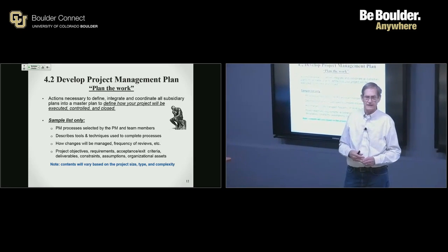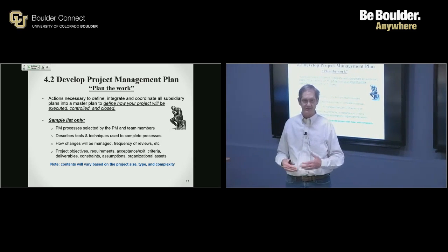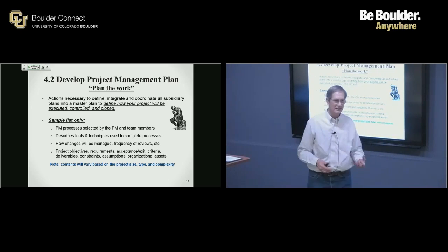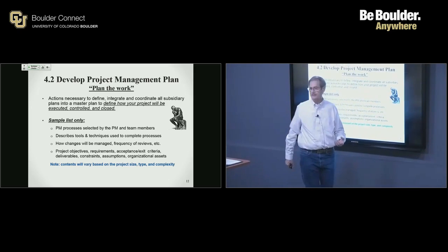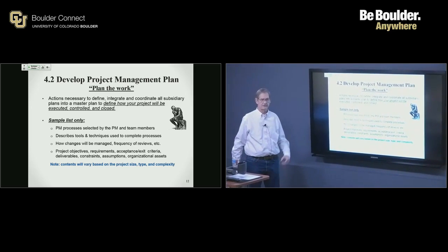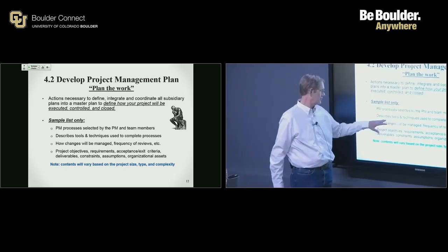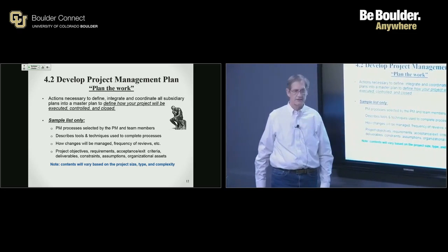It's very robust. And so there's certain training that needed to take place. So all of a sudden, I just signed up to use a tool on my project. Sounded like a good idea at the time, but it's going to end up costing well over $50,000 for training and for licensing and all that stuff. So you need to be kind of cautious about tools and techniques that you're going to use.